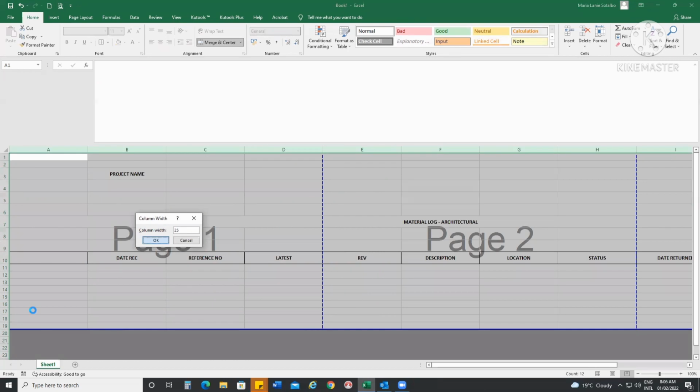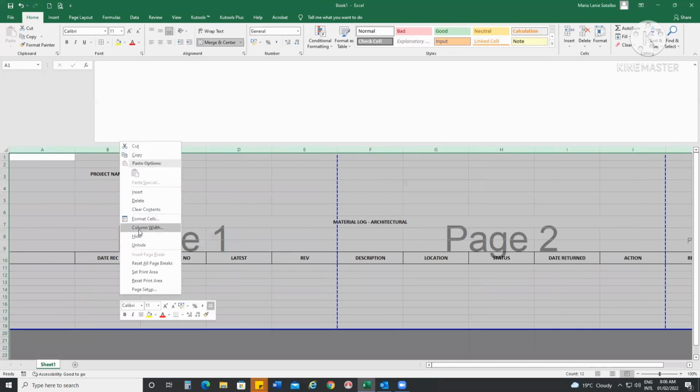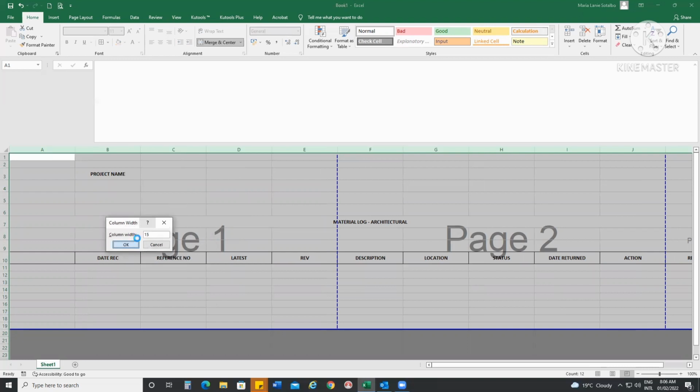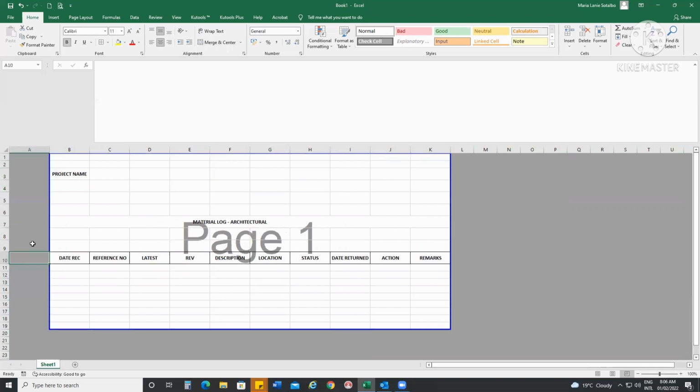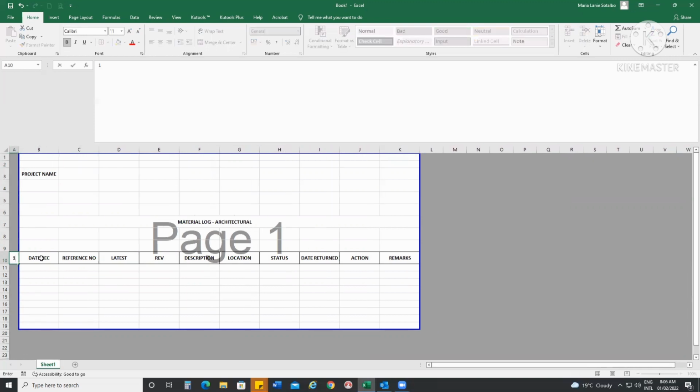Just one tip that I have to mention: if you are making your formula, make sure your table of the approval status will be on the upper side or the lower side, so it will not be affected or distracted, for example if you insert a row or delete some entry. It will be affected if you put it in the middle side. So it's better to make it safe, put it on the top, wherein you will not insert a row or delete something, an area that you will not touch from the very beginning.